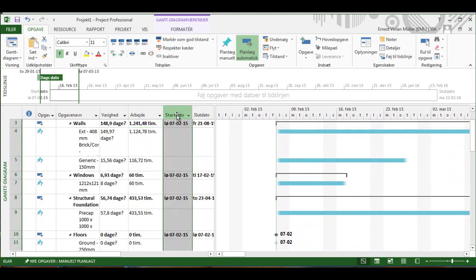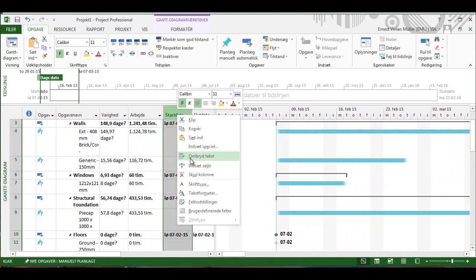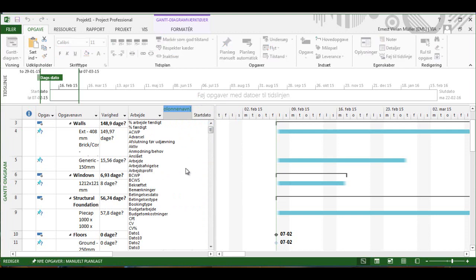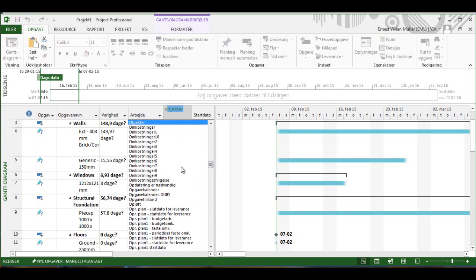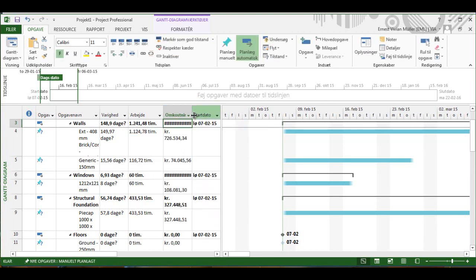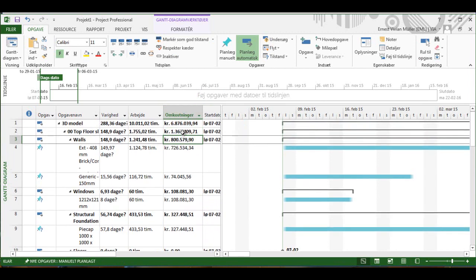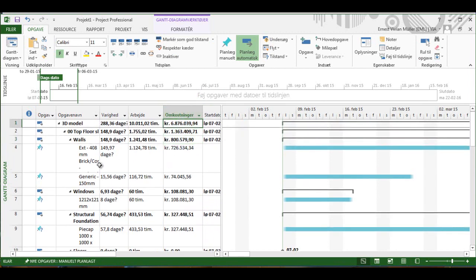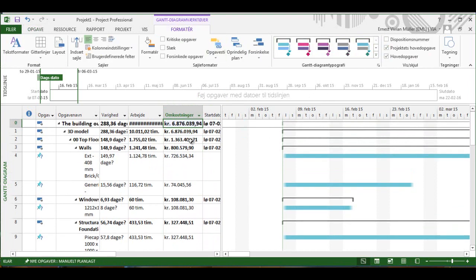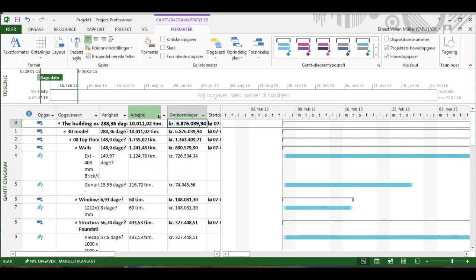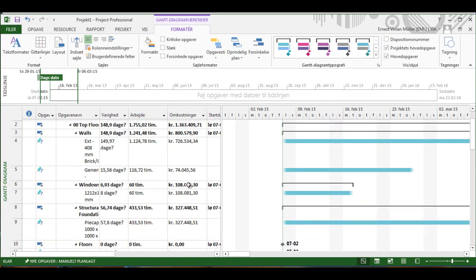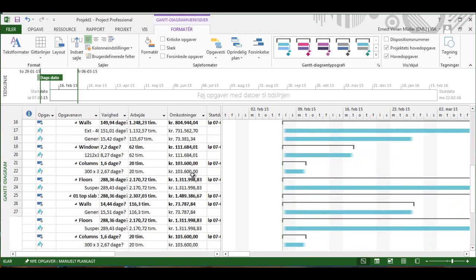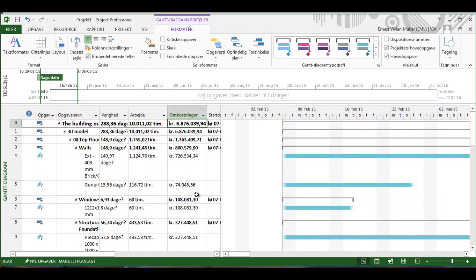So these are man hours and they're not actual team hours. I need to resource this in the same way. I put in an extra column in here called Costs in my cases and you can see this is the total price of the project. Based on just come in here and click the title, this is the total price of the project, total man hours. I resource them and link them in the usual way to check.